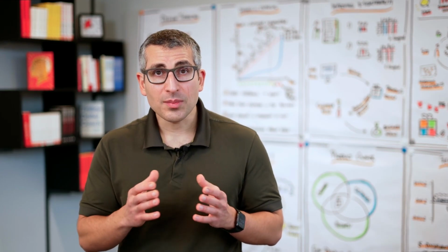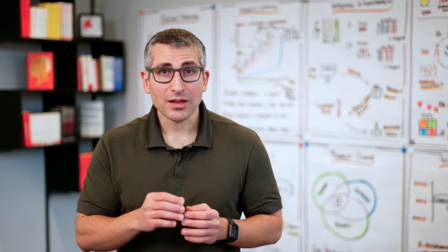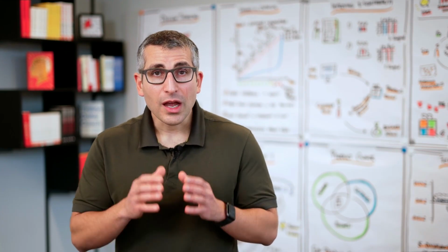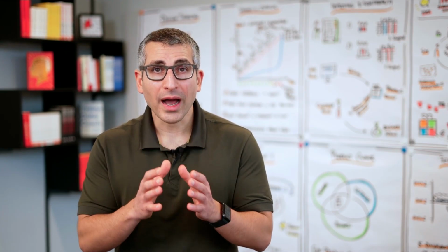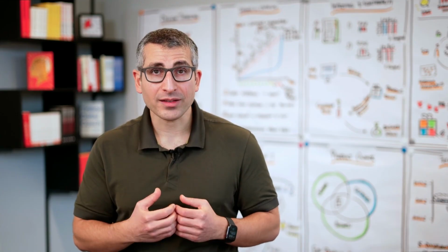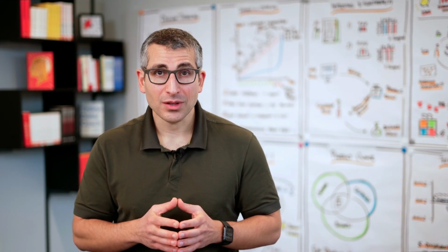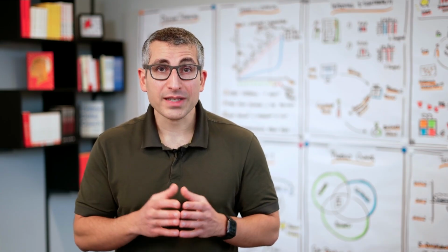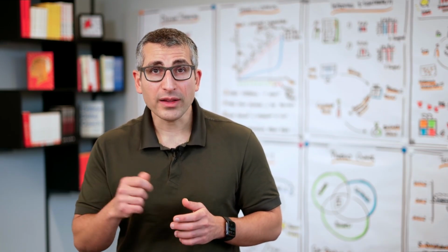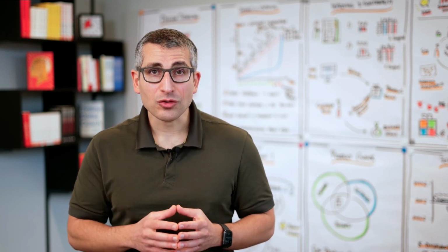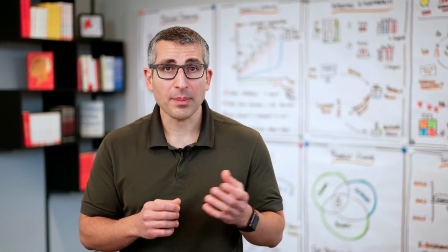If you are in a similar situation, maybe the following tips might come in handy. First one, always make sure you highlight out of which role you're acting. My team back then actually gave me two hats. A blue one for whenever I was acting as a product owner, and a red one for whenever I was acting as a Scrum Master. The only thing I had to remember was to put on the right hat whenever I wanted to act out of the product owner role or Scrum Master role.